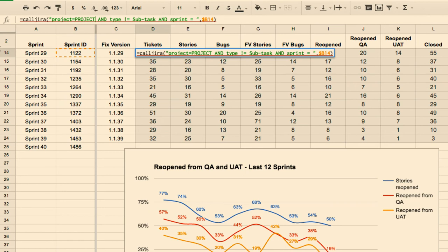I'm doing this by sprint, but instead of saying by ticket or bug or specific type of bug, you can add it to a component to say, show me all the tickets around the home page. Remember I tagged them with component? Maybe the home page is a real pain in the butt. You have a way to document and show that it is. If you want to do it by team or by developer, you can do reporting this way. You can go any number of ways with this thing, but the idea is to use Jira to your advantage.